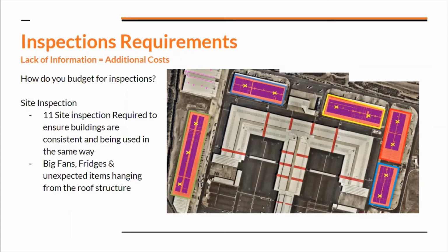So when we priced this initially, and the salesperson told me what they told me, good on them. They're just regurgitating the information the client's given them, right? So they haven't done anything wrong. They just didn't understand that what was initially quoted at, let's say, 1,000 is now quoted at more than 10,000. Why? Because we have to inspect 10, 11 spots. We have to assess all of these 10, 11 spots quite differently because they all have different types of loads.